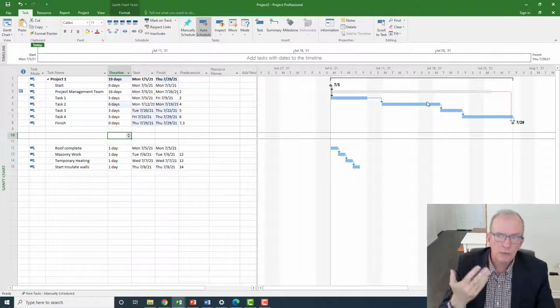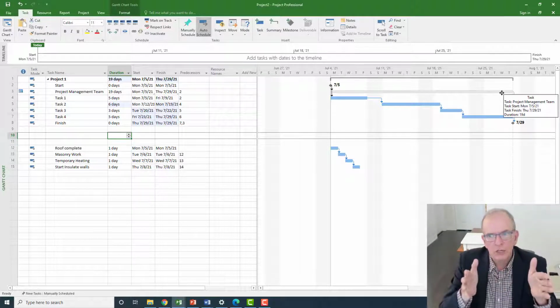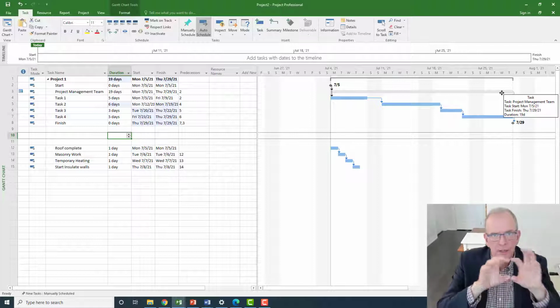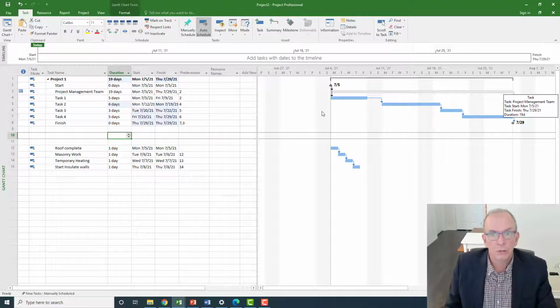And if I had resources, like I was doing a resource loaded schedule on this, then it would change the calculation, because every day that a work assigned resource is on an activity, it's a variable cost. So now it would be there more days, so it would do that adjustment automatically.